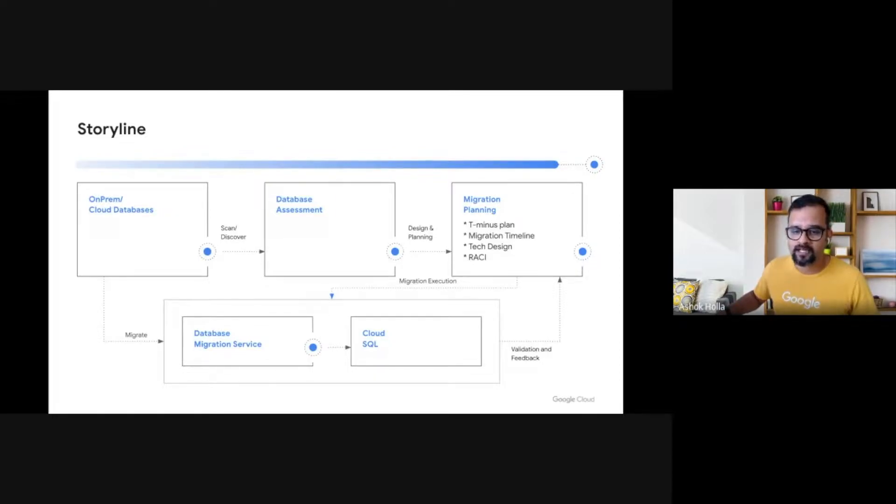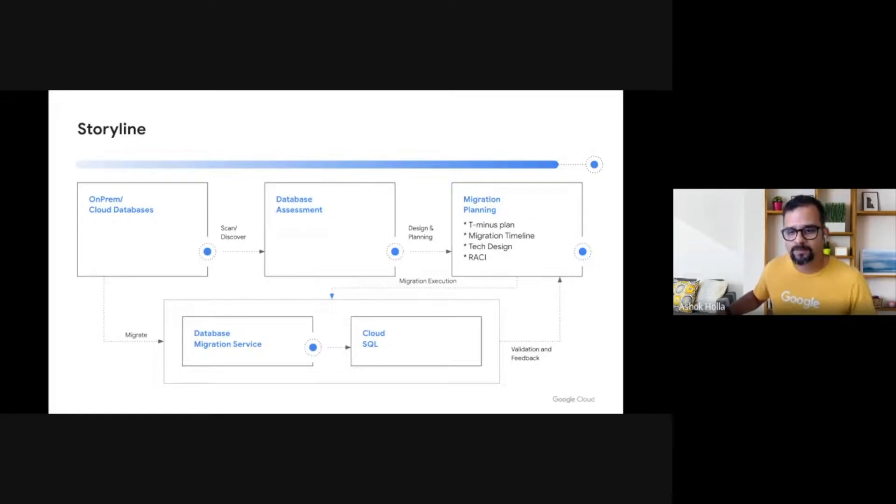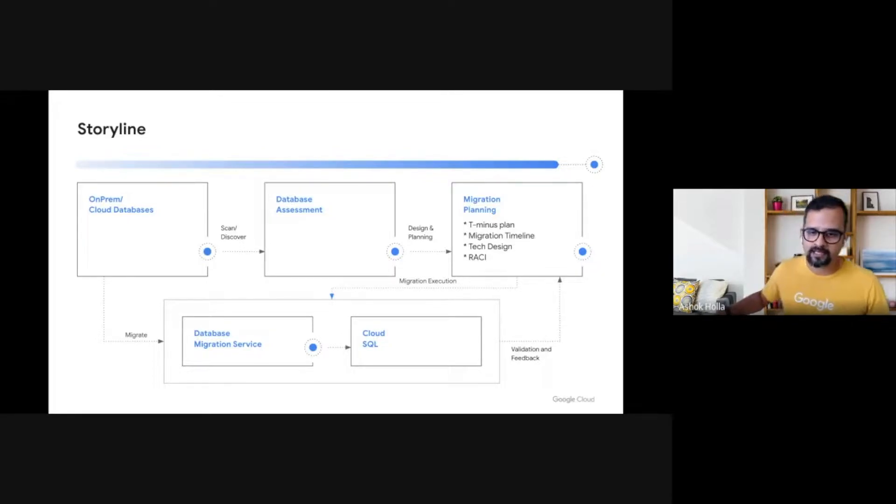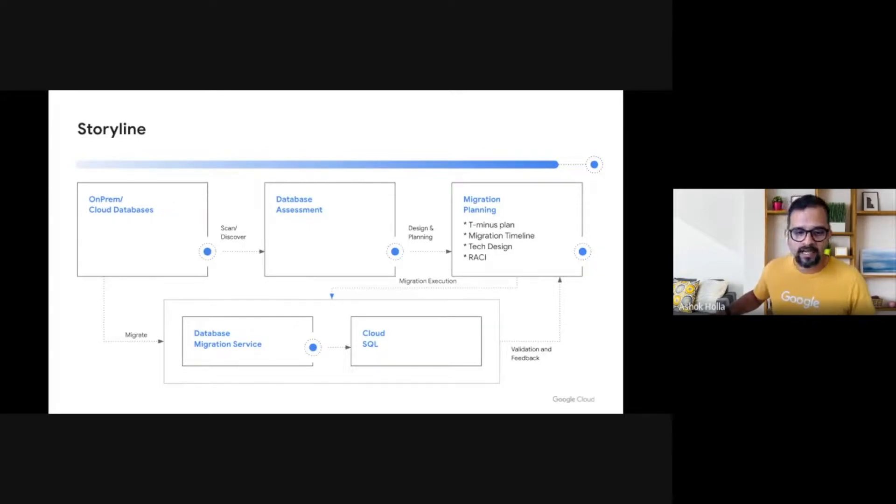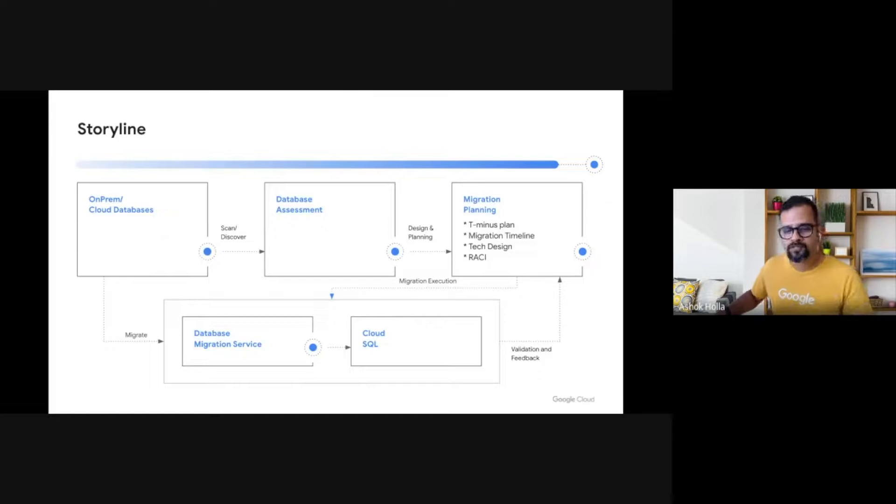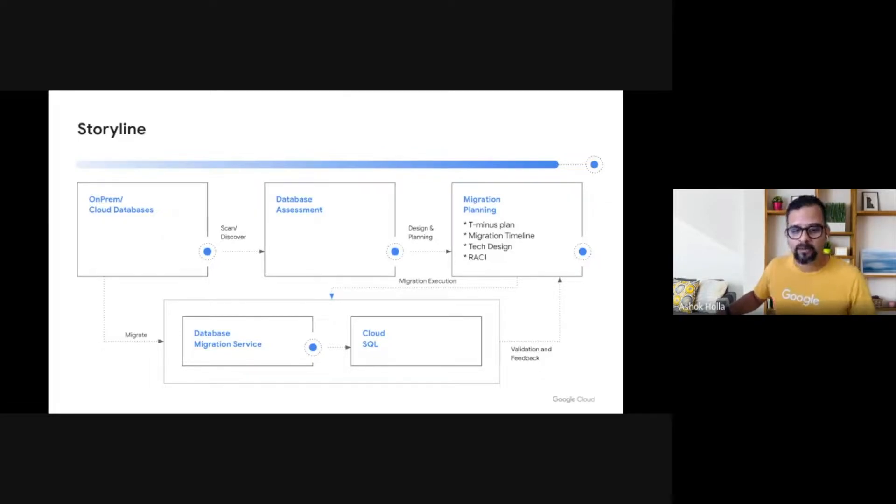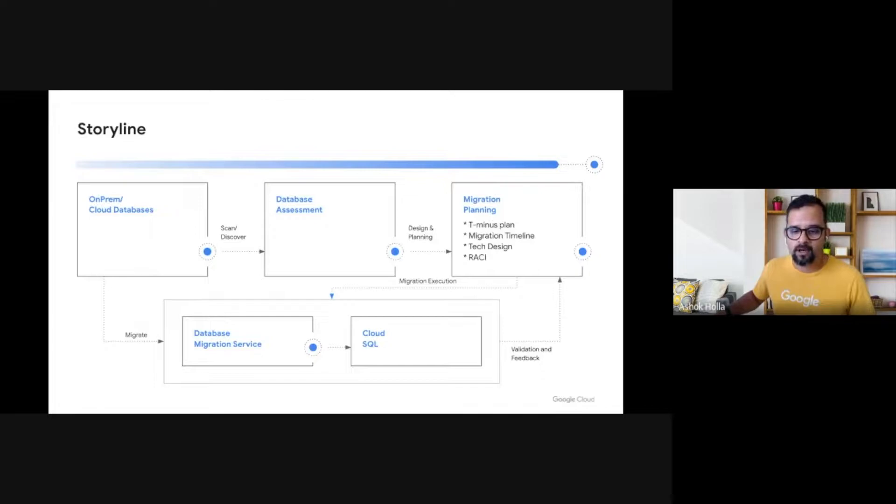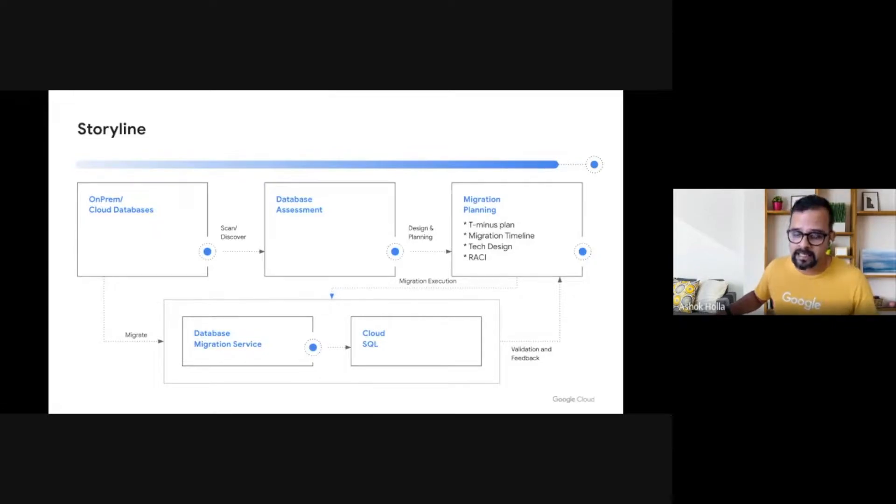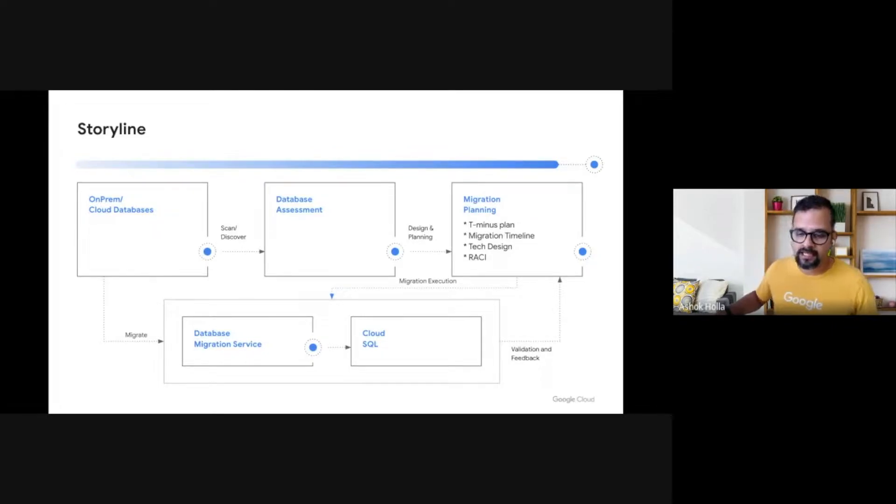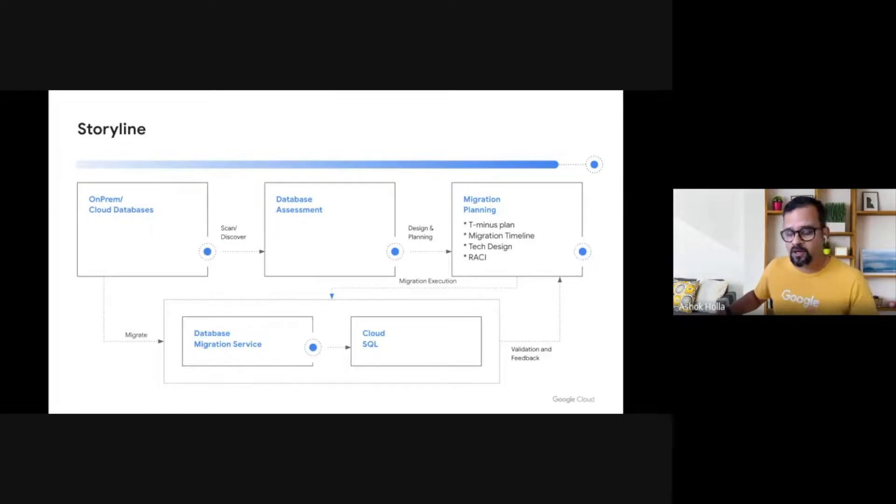We will then run a discovery/assessment of these databases and use the assessment report to arrive at the migration planning strategy document, which includes, at minimum, a T-minus plan, migration timeline, tech design document, and RACI metrics. And finally, use the various artifacts that we have created over the course of this migration journey to actually migrate the database from a self-managed setup to a fully managed setup on Google Cloud SQL using Google Cloud Database Migration Service. We will explain the detailed step-by-step process and the decision points that led us to choose a particular service or tool in this session.